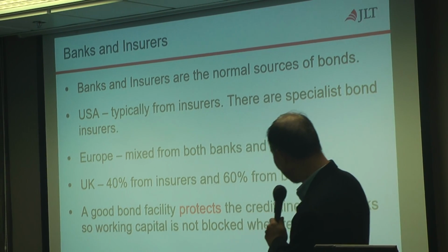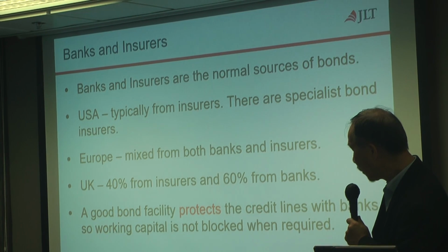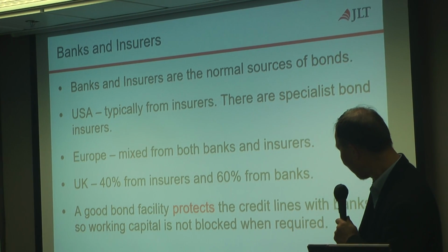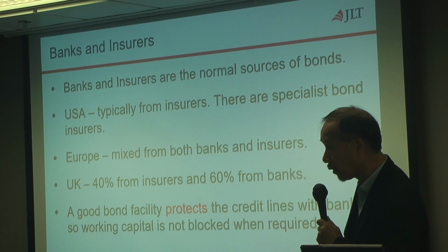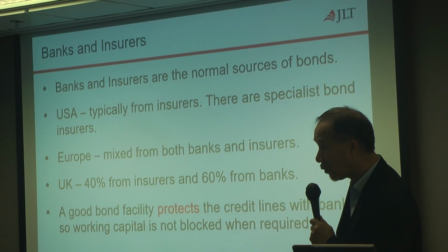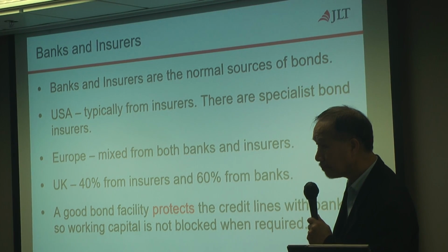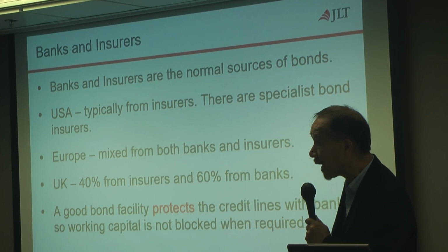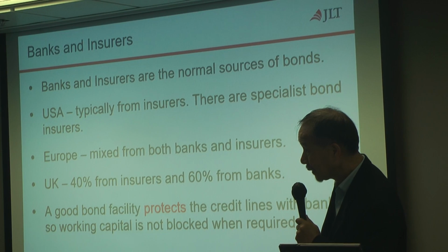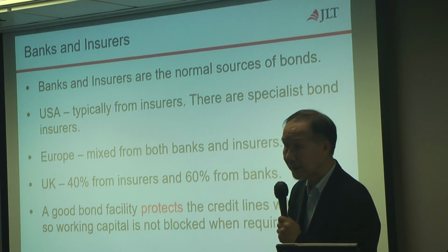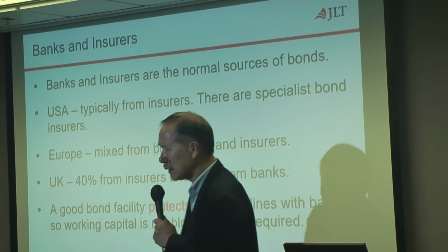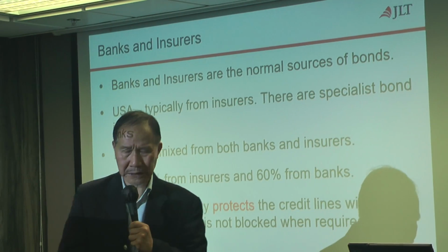Now this one is important. A good bond facility protects the credit lines with banks. So if you have a good relationship with the insurer, you can always keep your banking facilities for some other better uses. That means you are enhancing your cash flow capability.